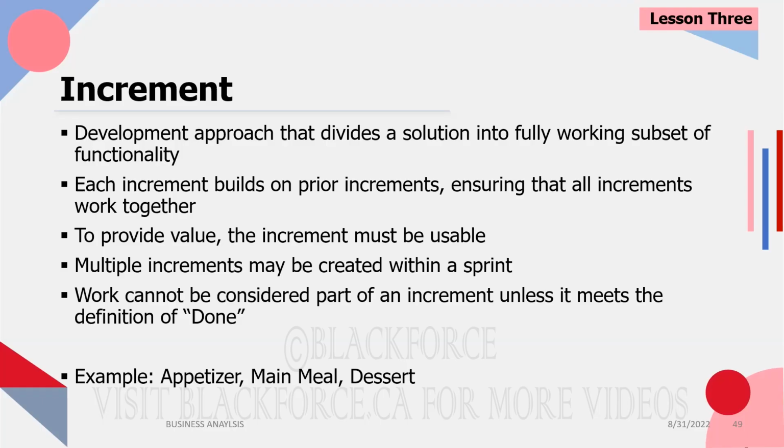Now, I said that story to get us thinking about increment. An increment is when you're building, at least in an IT project, in bits. Don't confuse that with iteration. Iteration is a way of improving what you've done before. So you're a baker, right? That's the example we gave. You're going to bake a 10-layer cake. Each layer of the cake is an increment. But a particular layer that you're trying to make perfect is an iteration.